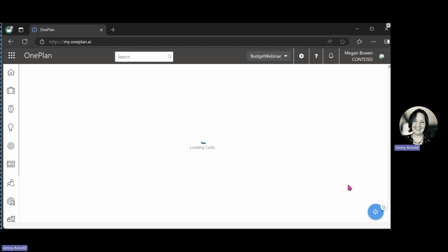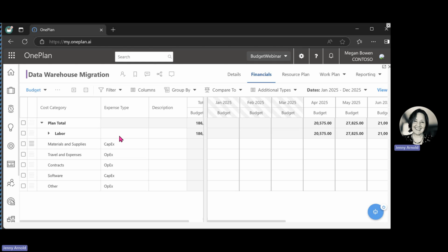Let's take a look at financials. So in the financials, we have these different, what are referred to as cost types. Sometimes I refer to these as capture points because what typically happens for an organization is that they're always tracking their budget in a particular area and then at particular snapshot times. So if you have to track, okay, what's your budget looking like in July? What's it looking like in October? You know, perhaps the beginning of your quarters, you'll want to snapshot these budgets so that you can make the comparison by quarter against what you have captured as your budget initially.